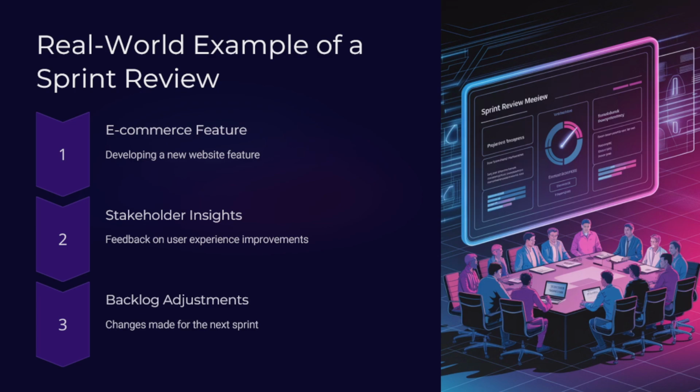Let's look at one of these real world examples of a sprint review. During one of these e-commerce development projects, the Scrum team developing a new feature for the e-commerce website used the sprint review to demonstrate their progress. The stakeholders offered feedback on the user experience improvements, leading to an immediate adjustment in the backlog for better alignment with the customer needs.